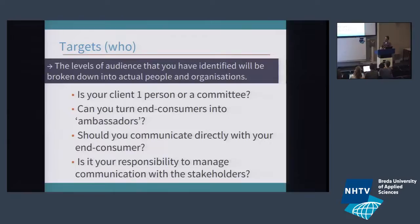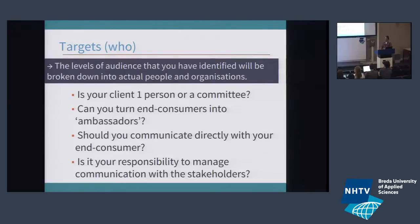For the targets in your communication plan, you want to be really specific. If you say 'the client,' well — does the client have an account manager or not? If there's a stakeholder committee, are you going to communicate with the info address, or have you gotten a name and telephone number of someone who works there? If you're communicating with end consumers, can you create some kind of ambassadors — people with a high standing within the player community? Through your forums, you get some kind of veteran status; these people can help in creating communication. All these questions are answered in the target column of your communication plan.